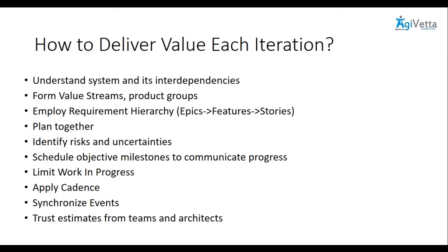Synchronize so that you are able to visualize what the dependencies are. They can be taken up, they can be mapped, and you can reduce the variability with that. All the feedback is obtained at the same time, and can be applied at the same time. If you want your teams to be predictable, it's easier to be predictable with the same synchronization events.